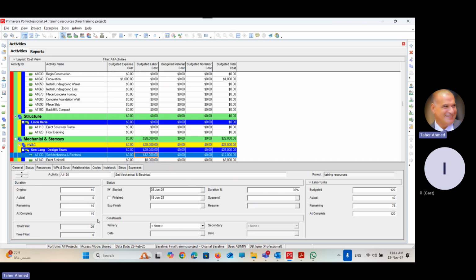All I have to do is import all the files together. The one coming from mechanical, coming from civil, coming from finishing work, put it in Primavera, click the new data date, and then I get the real progress of the activities.